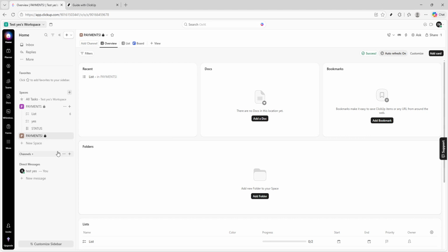Let's enable Assignee. In the Columns panel, find Assignee and click it to add or reveal the assignee column in your table. This immediately shows who is responsible for each task and makes ownership crystal clear. Once it's visible, you can click the assignee cell in any row to assign or reassign with just a couple of clicks. If you need fast organization, click the assignee column header to sort by owner, which helps you balance workload at a glance.